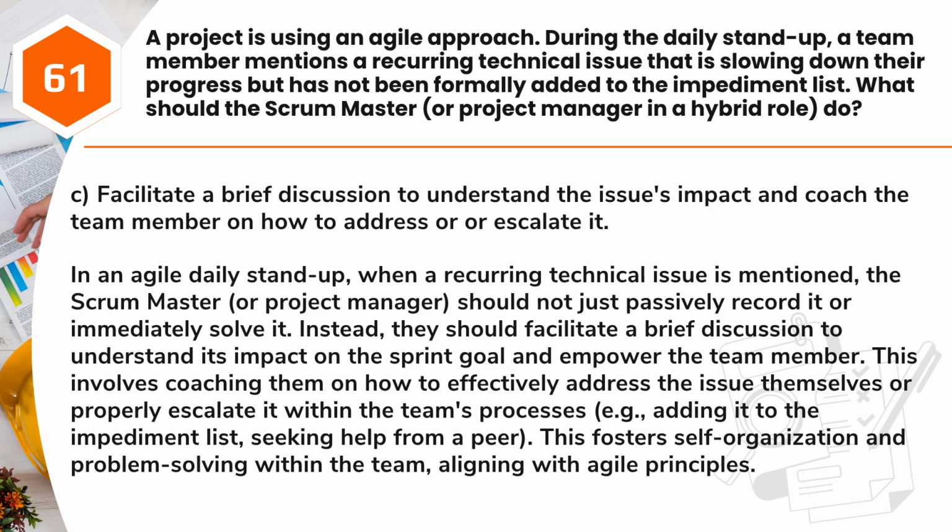This involves coaching them on how to effectively address the issue themselves or properly escalate it within the team's processes, e.g., adding it to the impediment list, seeking help from a peer. This fosters self-organization and problem-solving within the team, aligning with Agile principles.